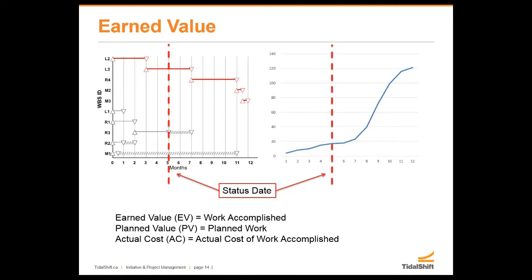And on that note, on the percentage complete piece, where we are at, if we're using software such as MS Project, it wants to know what is our percentage complete on work packages, on tasks. And a word of caution here. Human brain, yeah, we don't do percentage complete so well. The other side of it as well is that the percentage complete that it's looking for is percentage complete on a schedule basis, not on work.